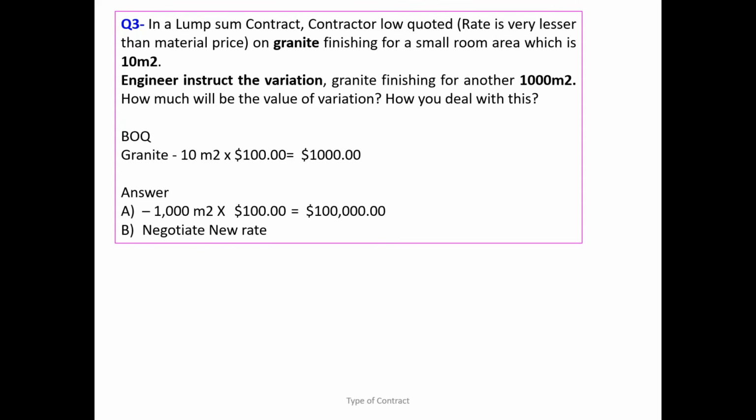So therefore, in the lump sum contract, the works are defined and the total amount is defined, not the rate. Rate is subject to challenge. It is not a remeasure contract. A remeasure contract is the one where the rate is very much binding. In the next lecture series, we will discuss that one. Now, look at this point. This is like a guidance point for you.